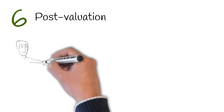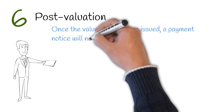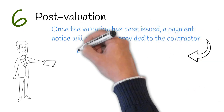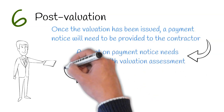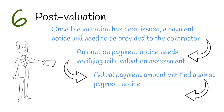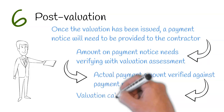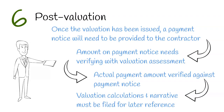Stage 6: Post-Valuation. Once the valuation has been issued, a payment notice will need to be provided to the contractor. The amount on the payment notice will need to be verified with the valuation assessment. Once payment has been made, the amount will need to be verified against the payment notice and a record should be kept of the amount paid to the contractor. All valuation calculations and narrative must be filed for later reference. Keeping records is vital and will be especially important should the contractor challenge any of the payments through an adjudication.